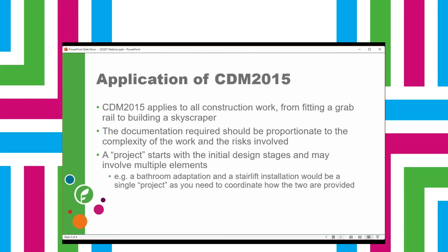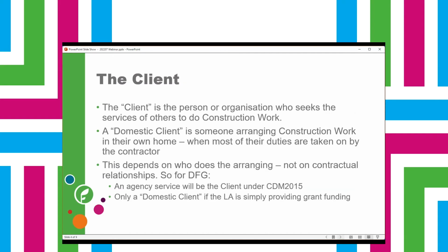Different elements of it could be linked together. So if you're looking at a bathroom adaptation and a stair lift as a single project, then you need to think about how the two are coordinated. If you put the stair lift in first, can you get the old bath out? Can you get the stuff up to the bathroom to fit it safely? And vice versa. So it's taking a preventative approach in terms of risks and health and safety, both in terms of constructing the project and thinking about the ongoing maintenance and use of a scheme.